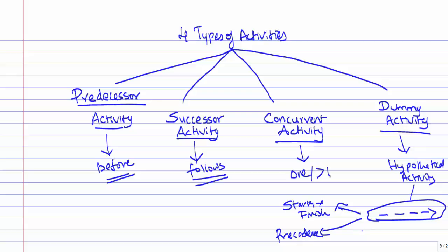And the third one could be to bring all loose ends in the diagram to a single initial and a single terminal event in each network using dummies. So this might sound a little technical now, but when you look into the real diagram prepared with dummies, you will be able to appreciate it.